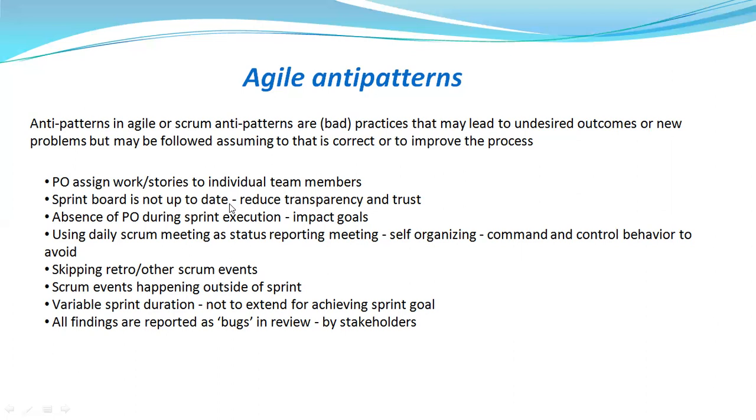The product owner should have a backup plan ready, and then if he or she is taking time off or is away due to some emergency, it is fine, because the team should anyway be self-managing and cross-functional, as I mentioned earlier. But sometimes during the sprint execution, if the team wants to clarify any requirement, a product owner should be available, or at least a backup plan should be available. So this is also one case which you may come across.